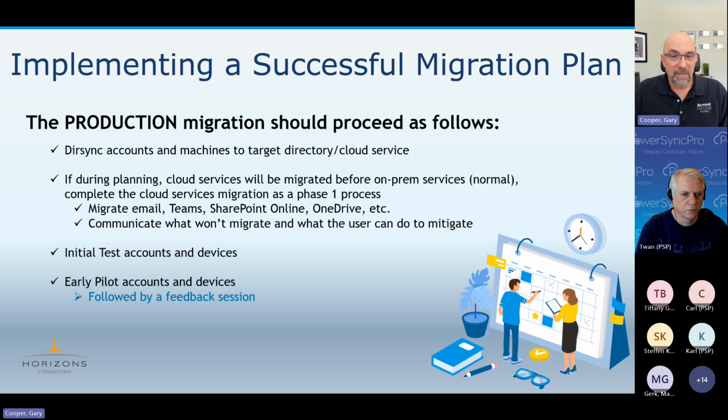But again, communicating what will migrate and what won't. Even within email, there might be parts that you either can't migrate or don't want to migrate. Then we'll start going into testing with real test accounts after we've synced. Test devices, those should be not pristine devices. Those should be devices that have a history. Maybe you replace another user's device with a new one. You take their old device and you enlist it as a test device. You want all the baggage that device payload offers, because a clean device will tend to migrate much differently than one that's been in production for a year or two.